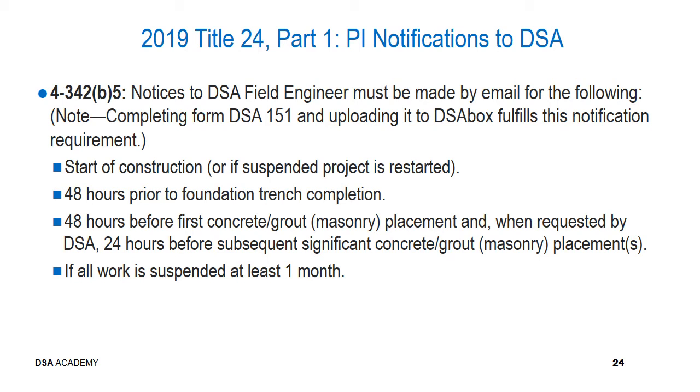Start of construction, or if it has been suspended, if on a suspended project it is restarted. 48 hours prior to foundation trench completion. 48 hours before first concrete, or if you have a project with masonry, then before grout placement. And when requested by DSA, 24 hours before subsequent significant concrete or grout for masonry placement.